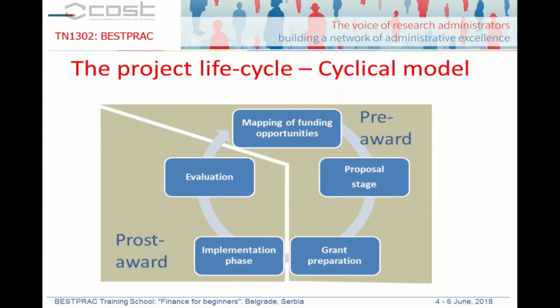You could say it's pre-award, if you like to distinguish it further, but in this setting I've included it in the pre-award stage. Then we have the proposal stage and the grant preparation stage. When those stages are done, you've developed and submitted the proposal, it's been selected for grant preparation, and grant preparation is finished, that's when you switch to the post-award stage. That's when the project starts, and you are into the implementation stage of the project.